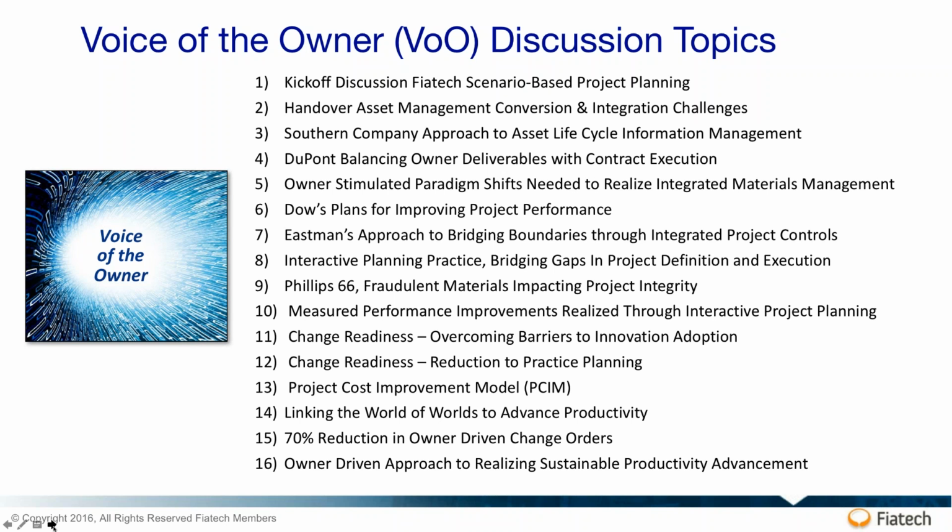So for example, if you're paranoid about pipe spools not being available and you decide, as a precaution, to order more spools from some other supplier, what you're really doing is hedging against the likelihood of a performance deficiency on the part of one pipe spool supplier, and hedging your bet by having it from someplace else. But if you have the visibility and predictability and information flow that you really trust, you may not necessarily do that all the time.